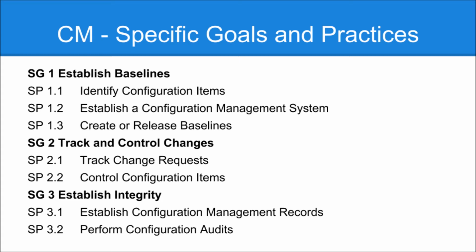The last part of practice 1.2 is to revise the configuration management structures as necessary. The third practice is to create or release baselines. So in this particular practice, there are some sub practices like obtain authorization from the CCB before creating or releasing baselines of configuration items.